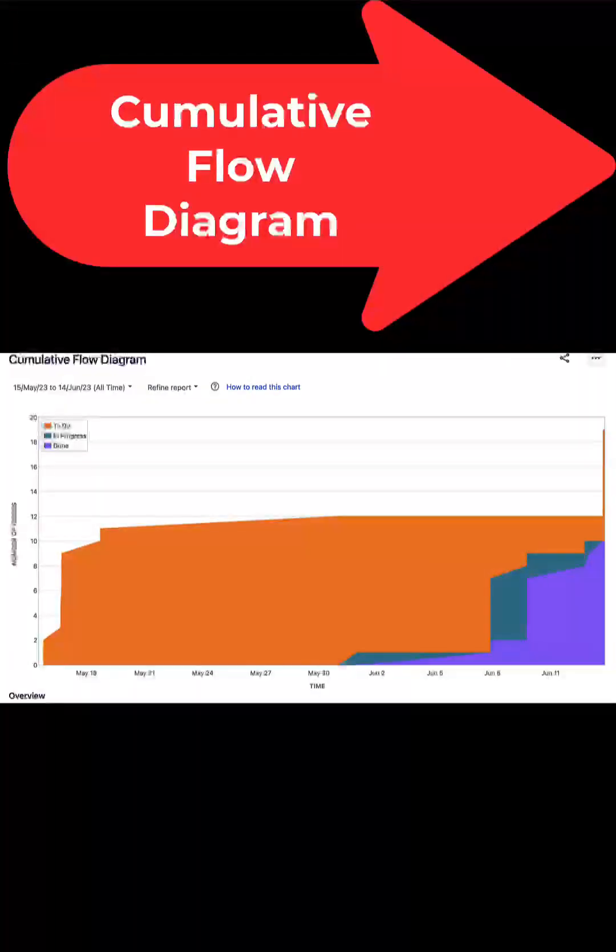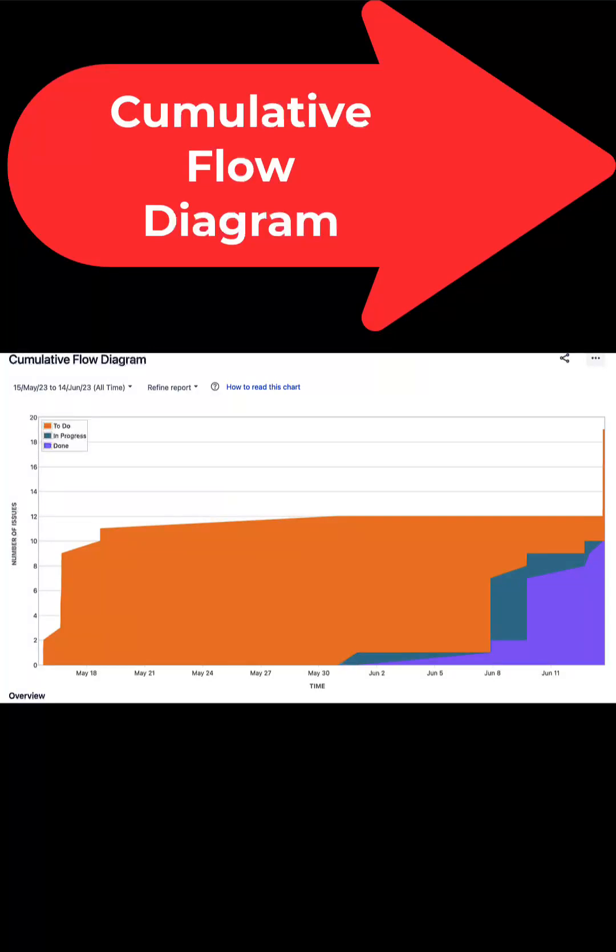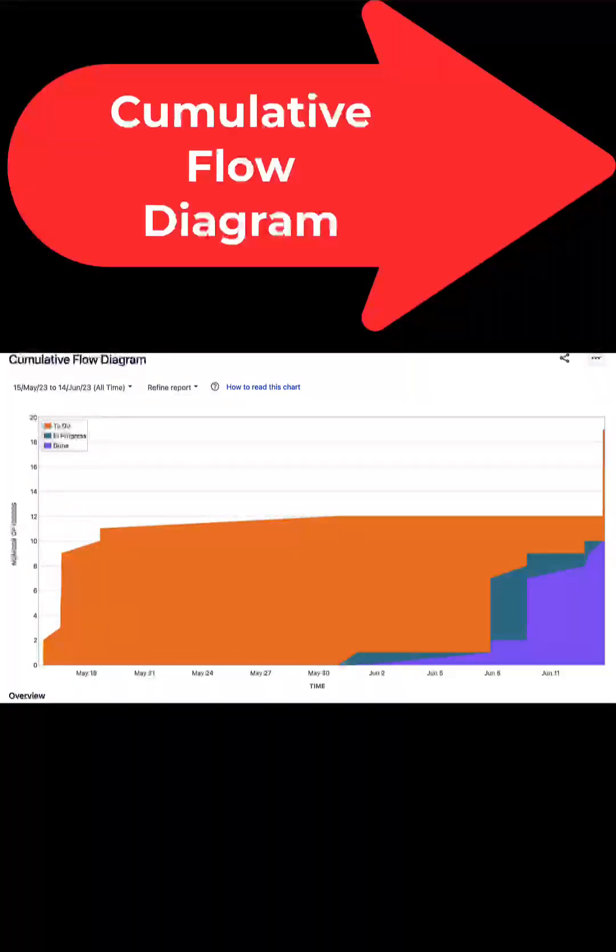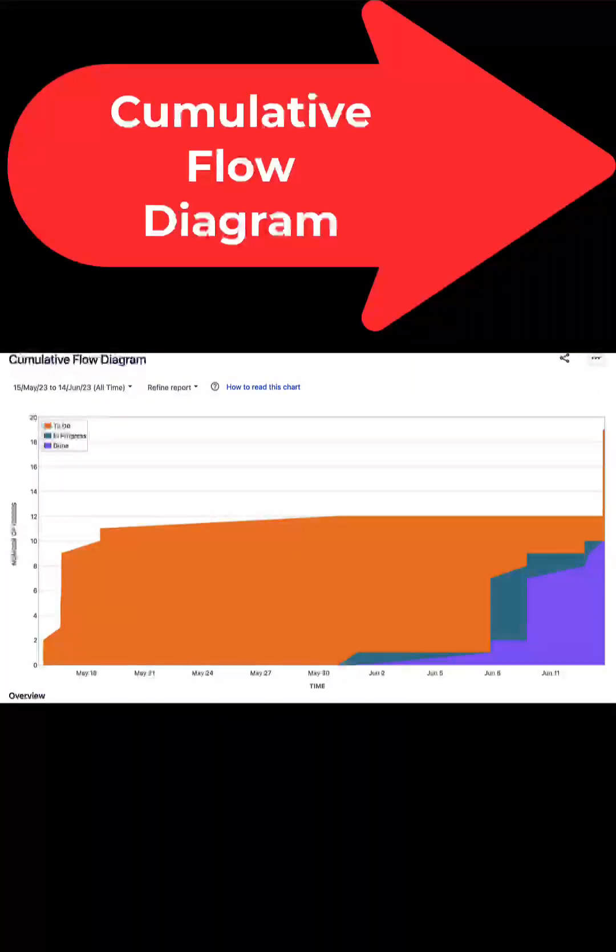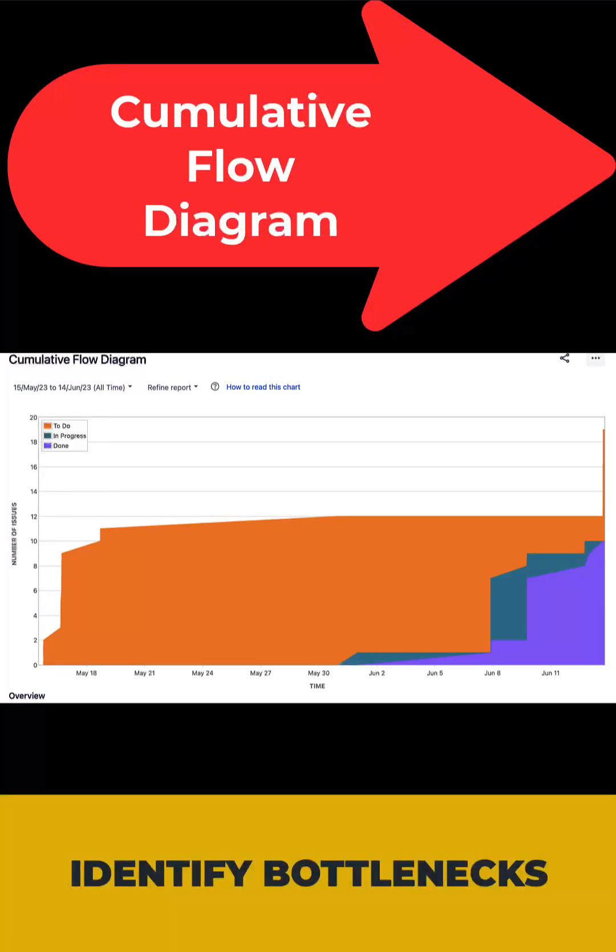Cumulative flow diagrams. This report illustrates the flow of issues while moving through different stages of a workflow over time. Use this report to identify bottlenecks.